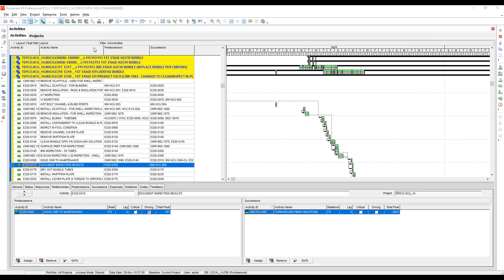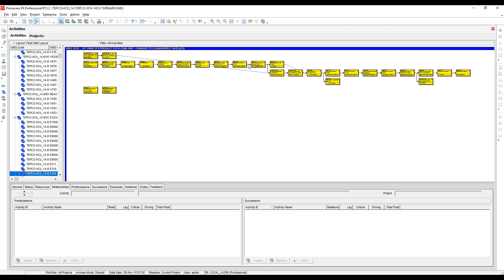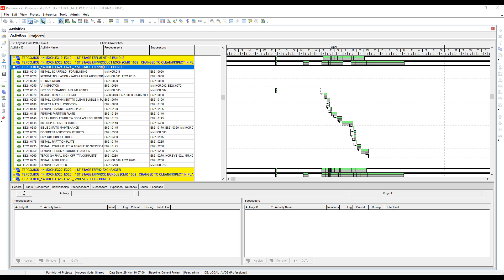You can also delete relationships in the activity network diagram, so I'm going to click this button right here. You can double-click them or single-click them and they turn blue, and you can hit delete on your keyboard, so similar techniques can be used in that view.